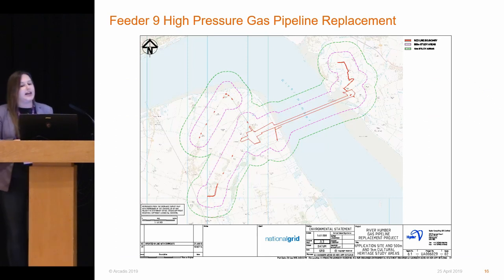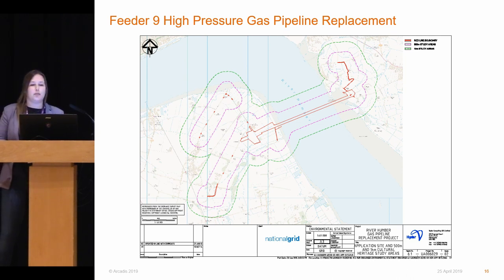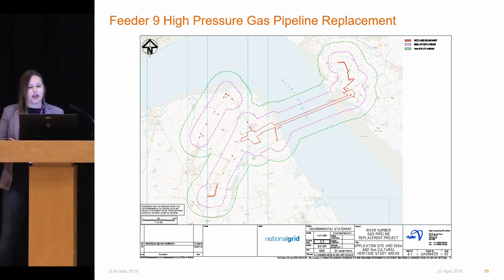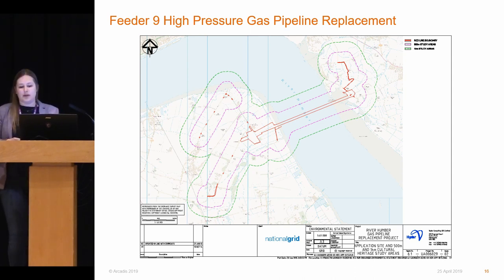So, the first project we'll be looking at today is a national bridge project. It was required to replace the existing high-pressure gas pipeline, Feeder Number 9, which passes under the Humber Estuary between Goxhill in North Lincolnshire and Paull in East Riding Yorkshire. Because this was a replacement of existing infrastructure, there were various constraints about the location. It needed to connect to the existing above-ground installations on each side of the river. The primary aim was to create a bored tunnel under the Humber at a deeper depth to avoid impacts from scouring of the riverbed, which was eroding the current pipeline.